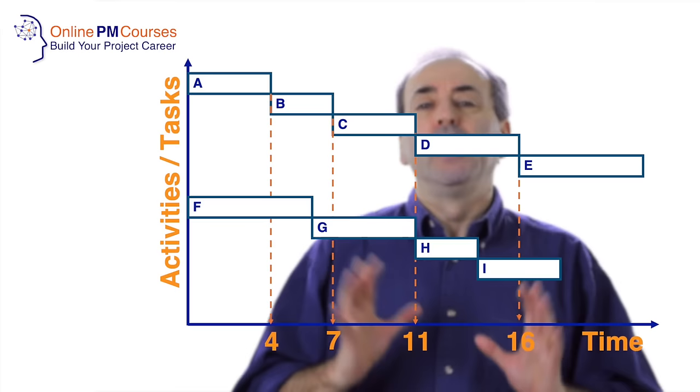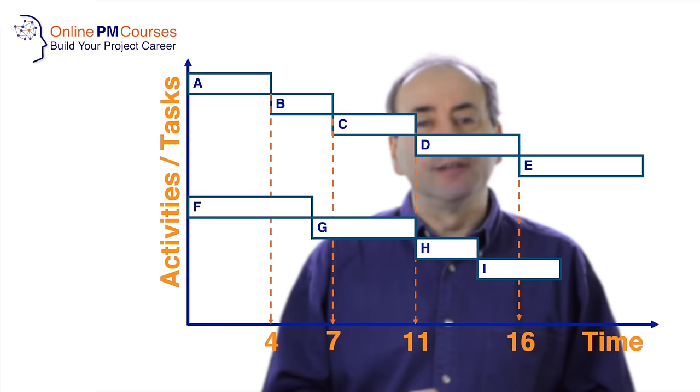The other commonly used symbol that you see on a Gantt chart is a simple geometrical shape like a triangle or a diamond that represents a milestone.